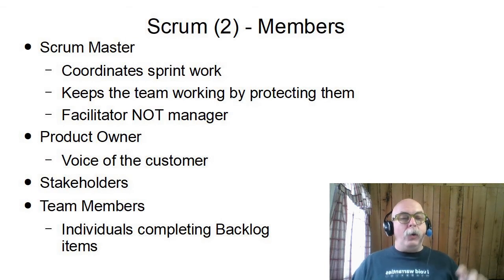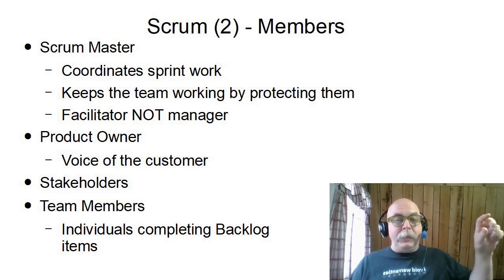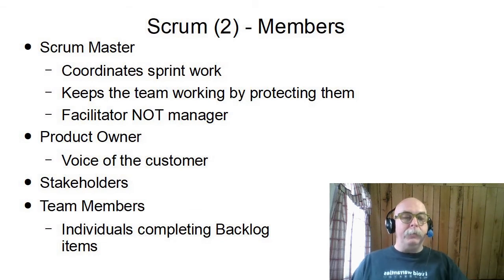Backlog is equivalent to the work breakdowns or the work packages that need to be completed to solve the problem. But because we don't know all of them yet, we just know a few of them at the beginning and learn the rest of them as we progress. That's why we don't call them work packages, we call them the backlog.